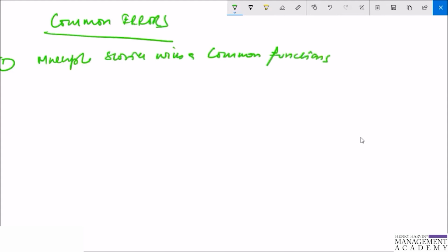So there are some projects where teams have multiple stories, but only one generic function. So a burn down chart can be misleading in these circumstances, because adding extra tasks will give the wrong information, the wrong number of the total hours. So tracking the progress with incorrect time is also misleading.